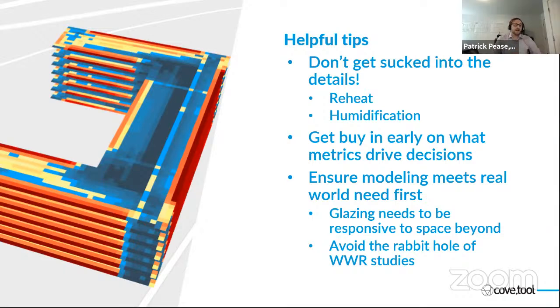Again, getting buy-in on what the metrics are going to be to drive the decisions is important. If you start out on a project and assume emissions is the most important, but you haven't got buy-in from the whole client team that that's the case, your decisions can become null and void very quickly. It might turn out that cost was the most important factor, and that needs to rule all decisions.